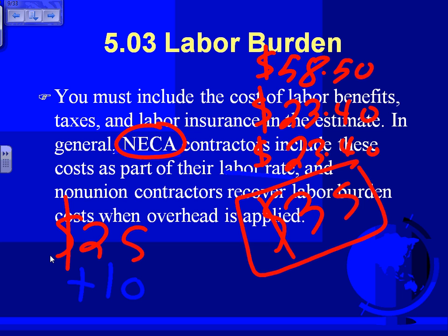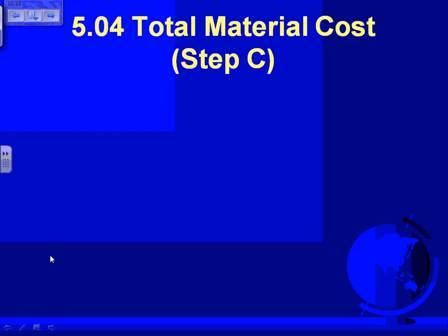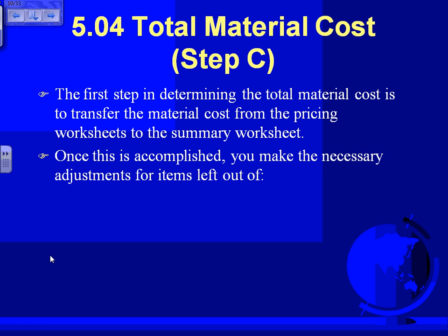And then, of course, you're going to put your overhead and your profit over there. Does that make sense, guys? So $25, this is bring home with you. $10 benefit or burden. And for a total of $35 or so. And every company is different, but that will give you some idea. Any question about this? The most important thing is the burden. The software that we have, guys, will add the burden separately. Total cost material, we add them up as you can see.